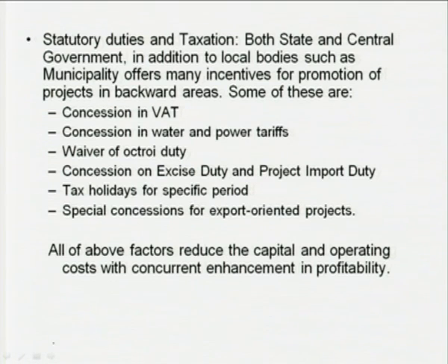The local body may waive octroi for you, then concession on the excise duty and project import duty, then tax holidays for a specific period, and these concessions are even more pronounced for export oriented projects because they bring a lot of foreign currency to the country. Now, all of these factors reduce the capital and operating cost with concurrent enhancement of profitability.